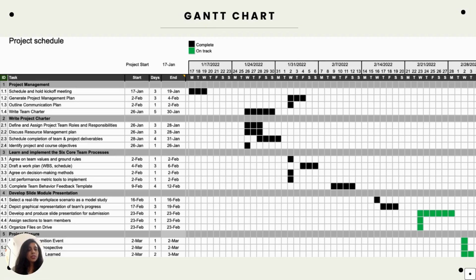Here in the project management column, you can see the tasks, which are the smallest component in the WBS, that is work breakdown structure. You write down all the tasks. You write down all the activity ID numbers from the WBS dictionary. The ones you see 1.1, 1.2, 1.3 are all imported from the WBS dictionary, as we learned in the previous section what is WBS dictionary. All right, so we import information from WBS and WBS dictionary.